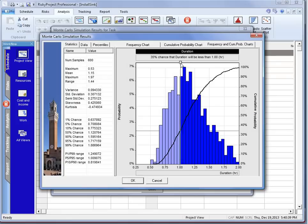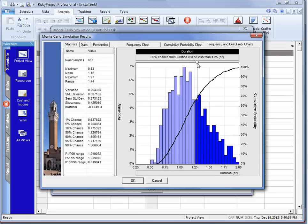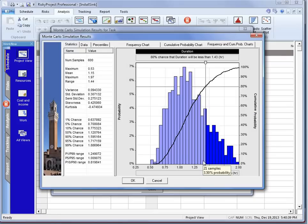So if I wanted to be more sure that I would meet a deadline, I'd probably put my estimate, my original estimate, when I told my wife how long it's going to take me, I would tell her it's going to take me about an hour and a half. And it shows right here, it would give me that 80% confidence that I would be able to finish it in that time. Still leaving some risk out there, so I know that I'm going to have to work fairly hard so I don't overrun that. But it does give me a good buffer.